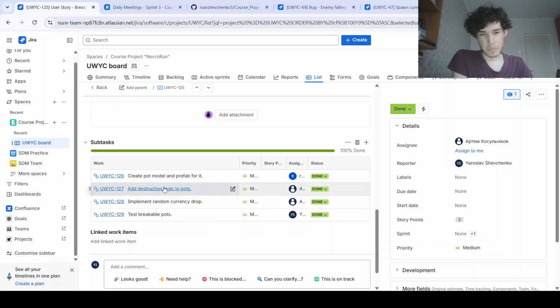for each user story. As Scrum Master, I assign different members of the team to the user story and the subtasks, set priorities for both of them, and set the number of story points, which were determined during the poker playing sessions and were taken from the Fibonacci numbers.